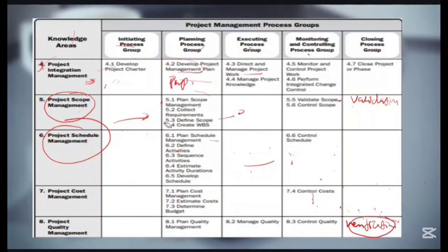And I do that a lot on my site. I get them to verify the work before we get it validated. So everything we do, we put a stamp on it. And I've told my supervisors, if you stamp the pallet, we manufacture wooden pallets, if you stamp it, it means it has been verified. If we take it and there are issues, you will pay. So we need to verify.